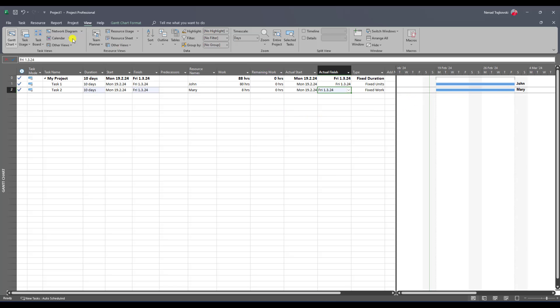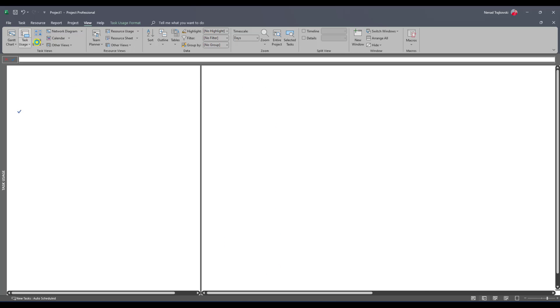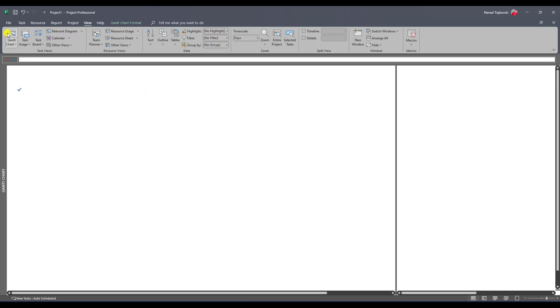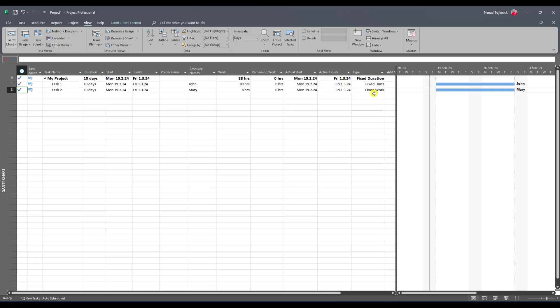So if you have a problem and you want to spread fixed work over some time period, then you should use task type which is fixed work. Because it really is, you said, I want to finish fixed amount of work, in my case, 8 hours, during some time.